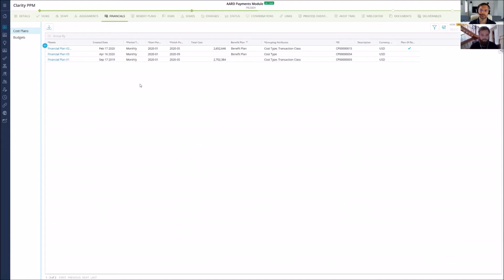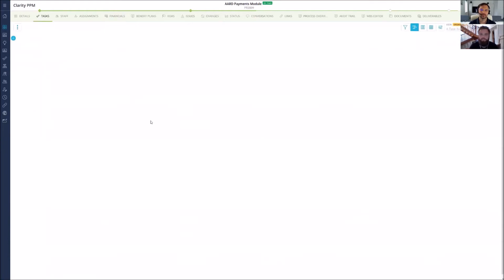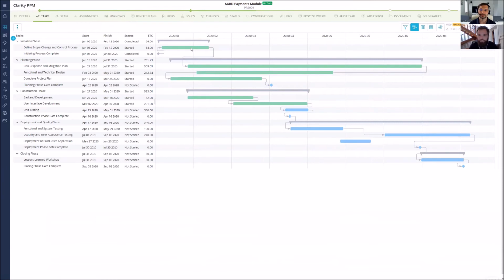One is you have to follow the tasks and their completion, so the work actually being done. The other is the resources that you are using for it, whether it's on track, whether you are using a lot more people or a lot more effort than you previously calculated. And the third is financials, and of course all three are interlinked, because if you are delayed with your tasks and you put more effort into it, then your finances will most likely be also upside down.